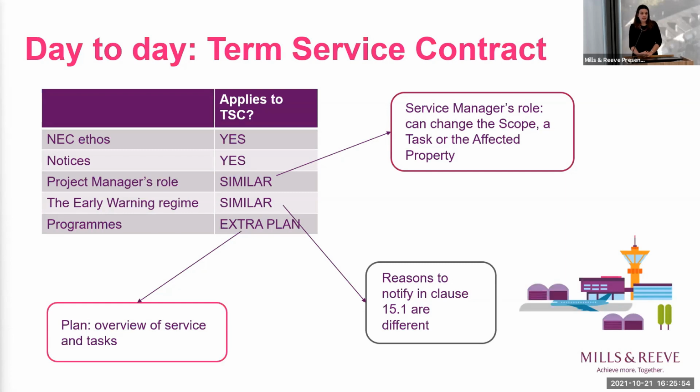On the term service contract, again, these clauses still pretty much apply. So the NEC ethos points all apply absolutely, and the project notices are exactly the same. The service manager role is very similar, to the point I made. So the service manager's right to change the contract is limited to the scope, a task, or the affected property. And I'll come on in a second and explain what the task is. The early warning regime, again, is very, very similar with slightly different wording in clause 15.1 about the reasons you can notify an early warning.